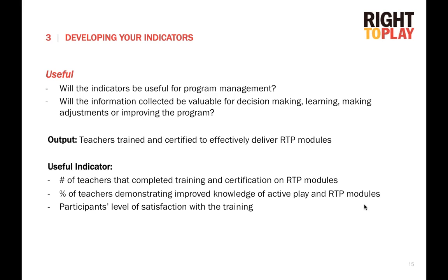We definitely do not need a PMF for each location, but there may be different PMFs needed within one country. If there are different programs trying to achieve different outcomes, each of those programs will need its own PMF, because you will have to develop a measurement plan for each of those programs.